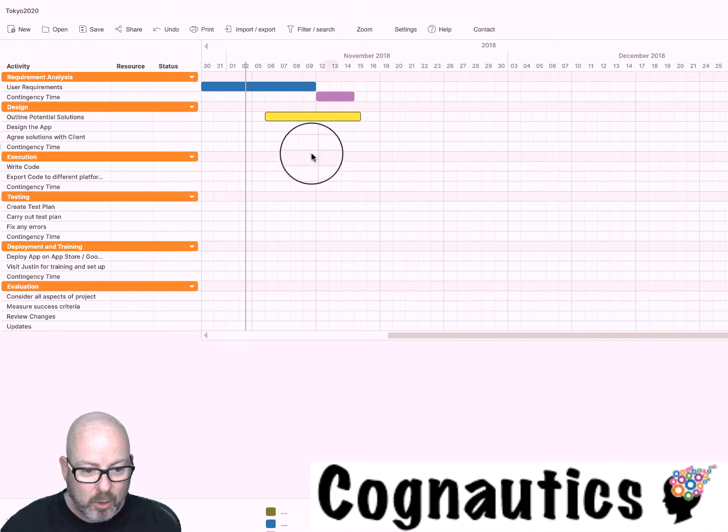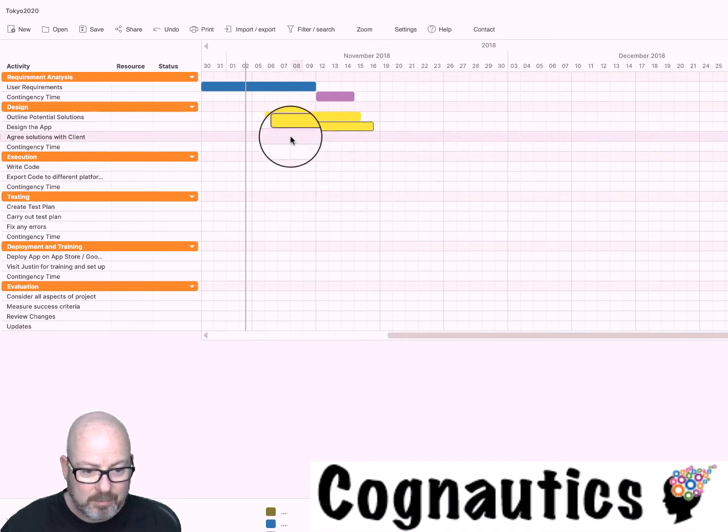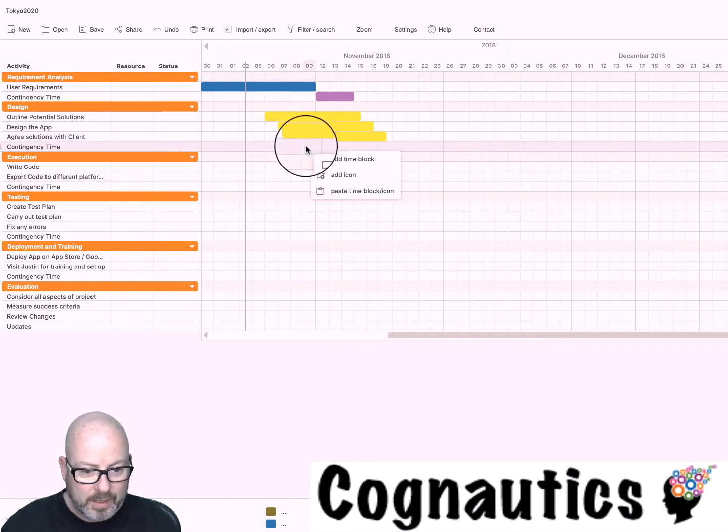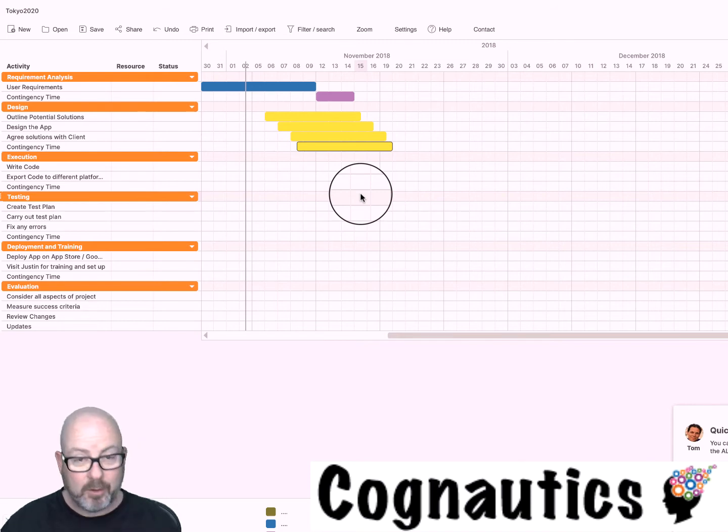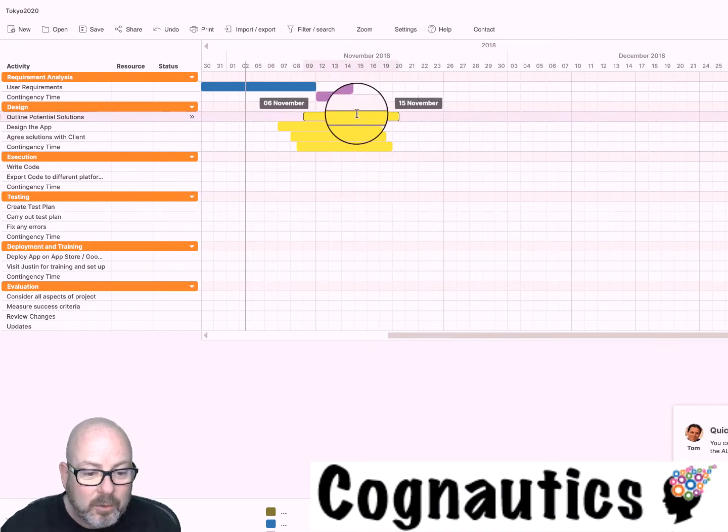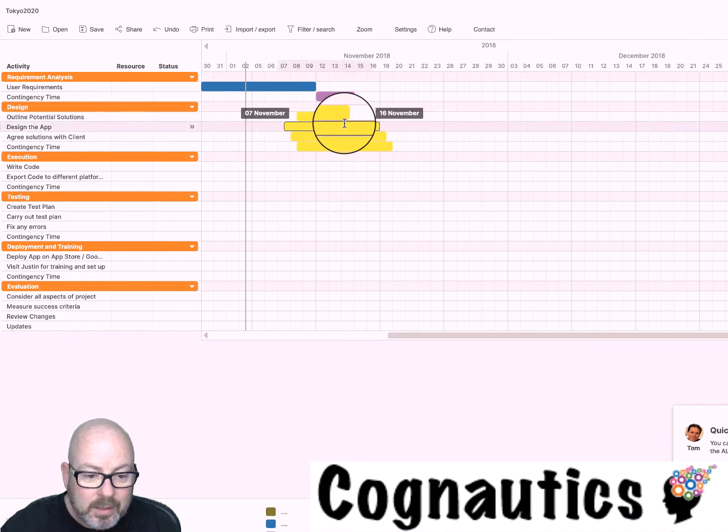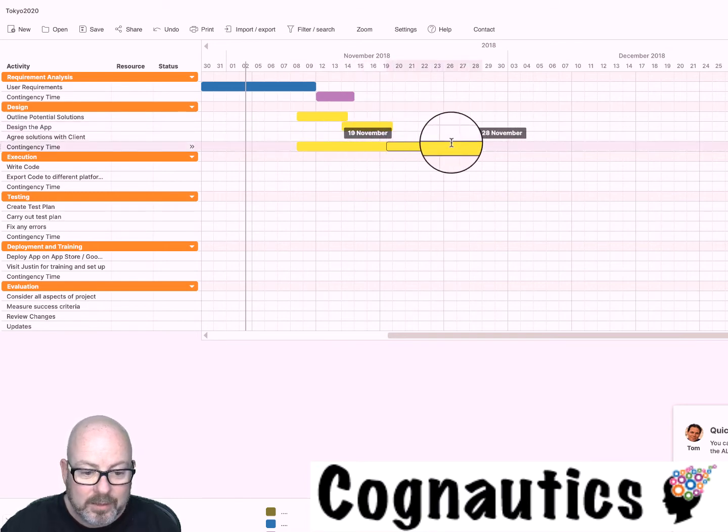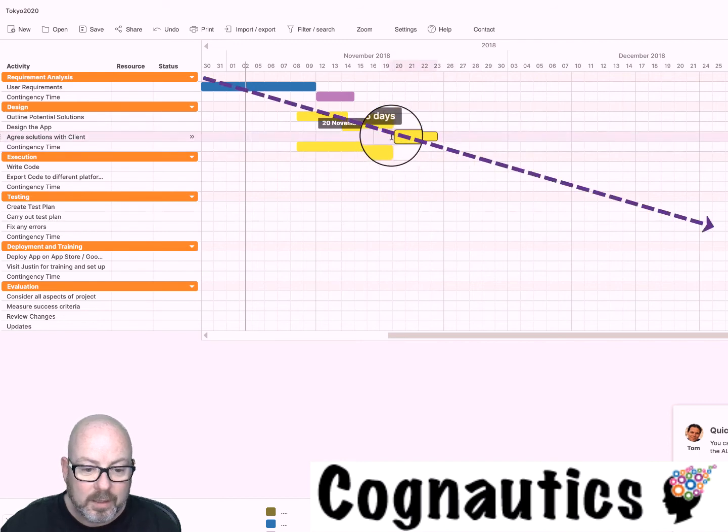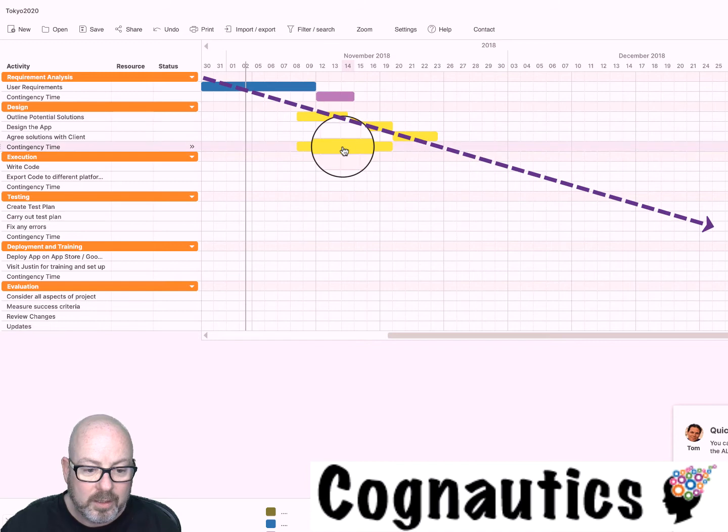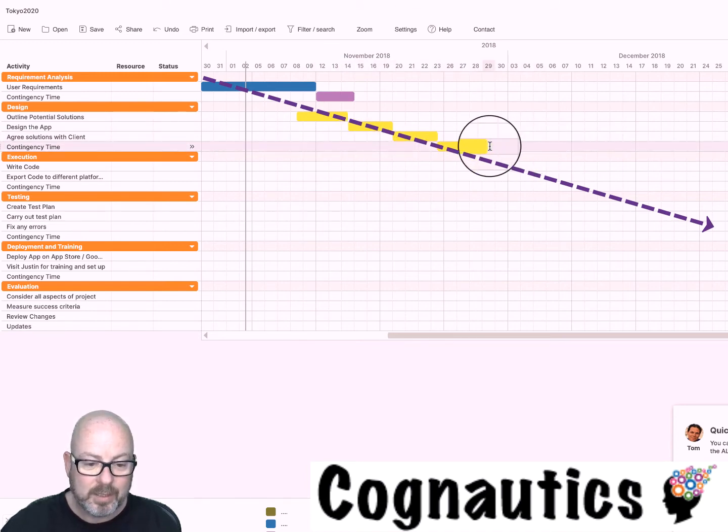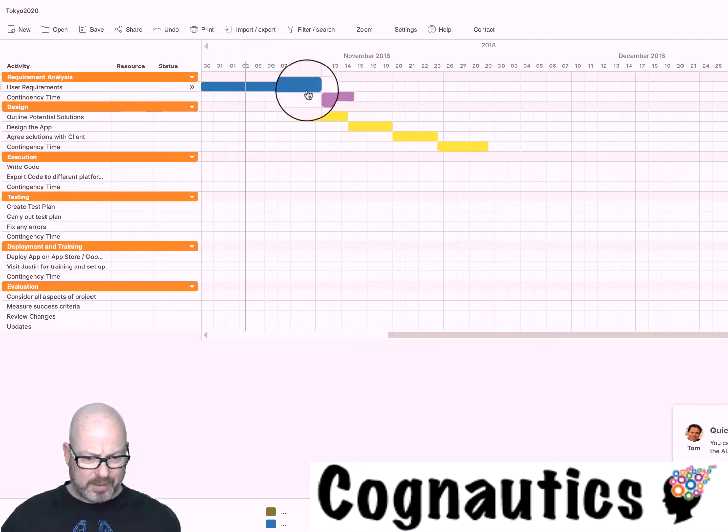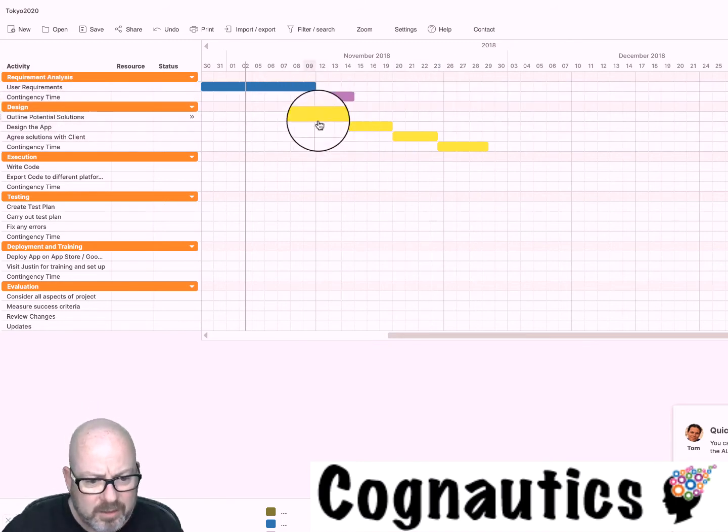You can decide how long you want each task to last. You can copy that time block, you can paste it and then you can start to play around with them and see roughly how long things are going to take. The way this should look ultimately is that you're going to end up with one job happening after another. So this thing is slowly going to snake its way from left to right. Ultimately you should finish one job before another one starts.